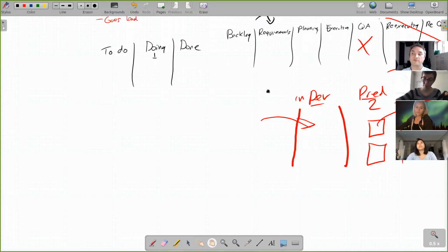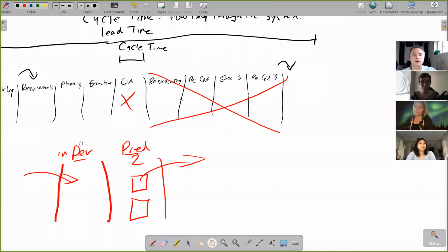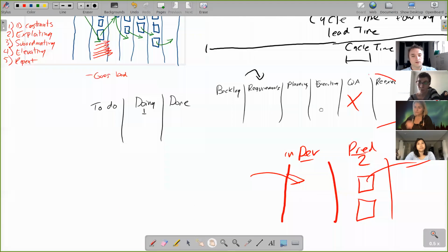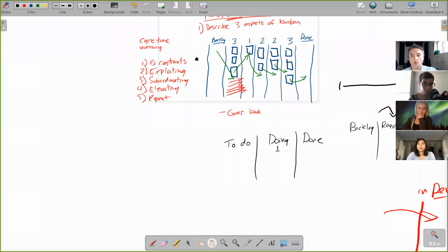Deming called it a system of profound knowledge. And then the first step is, before they change anything, visualize the process. What does it look like right now? And then, using that tool, where are you constrained? And if you start fixing stuff that isn't the constraint in their process, that's a really good way to get the people who do the work to not be on your side. Like, whoa, why am I the problem? Why are you worried about me? That person over there, this whole thing is broken, and you're starting with me?